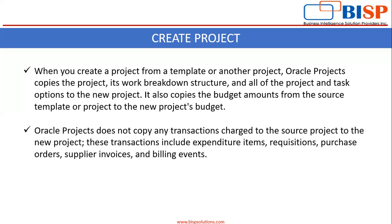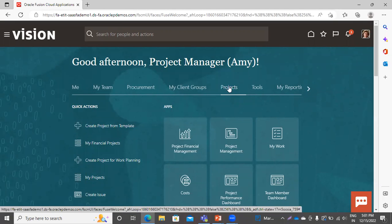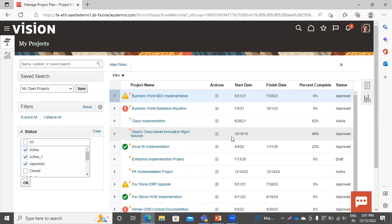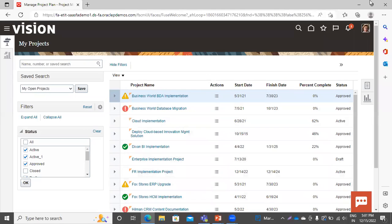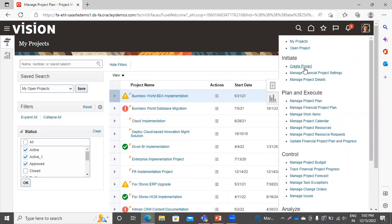Now we will move to our application to see how a project is created in the Fusion application. Click on the project tab and go to Project Management. The role provided to the user is the project manager role. You can see the projects listed here — these are the open projects owned by this user. To create a new project, click on the task list and in the Initiate field, select Create Project.